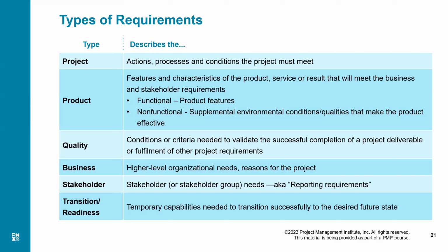Naturally, while we are collecting the requirements of this product, we need to ask the stakeholder up to what level of accuracy they will accept for this functional requirement. And we also can provide some details on how we are going to do the measurement, what kind of equipment we are going to use, and what kind of methodology is going to be implemented. All this will be compiled in design documentation.